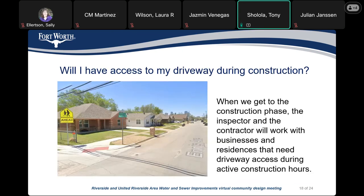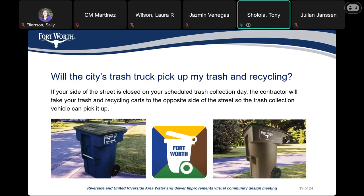Will folks have access to driveways during construction? When we get to the construction phase, a city inspector will be assigned, and both the inspector and the contractor will work with businesses and residences that need access. During active construction hours, for the most part, access will be provided to all businesses and residences. Also, on scheduled trash collection days, the contractor will move trash and recycling bins to the opposite side of the street so the trash collection vehicle can pick them up.